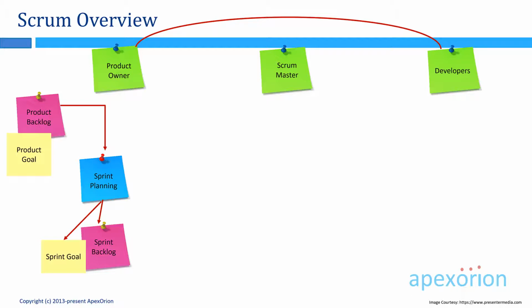After sprint planning, the team starts doing the work. During the sprint, the developers meet daily to review the work that has been done so far towards the sprint goal and determine what they'll do in the next 24 hours. This event is run by the developers. It is for the developers. The Scrum Master attends for 3 reasons. First, to make sure the event is taking place. Second, to make sure that the time box is maintained.